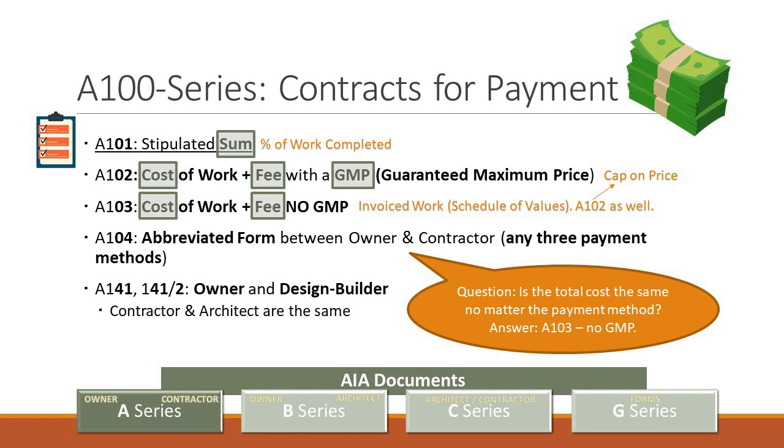You have this excavation line item, and you haven't done any work, but you've got all this equipment. So as the architect, you need to gauge and help the owner understand why the work may not be as far along as the percentages, and you may need to keep the contractor in check so they're not billing too fast. Because what you don't want is too much of the money front-loaded on a lump sum project, and then we get to the back end of the project and there's not enough money to finish. So that's a word to the wise.